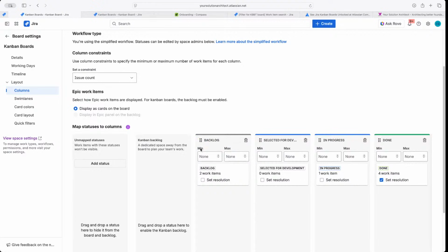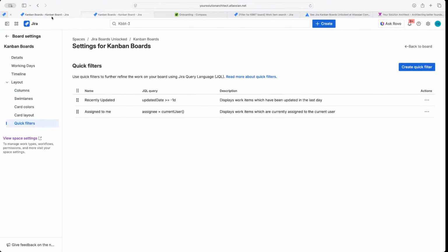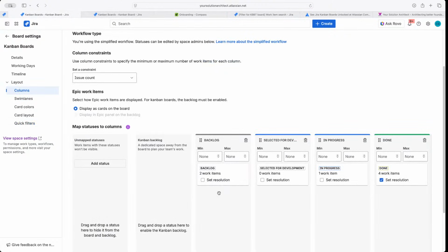This is where you can put your work in progress limits as well, those WIP limits. So we're solving the other card, I'll go back to it in a few minutes, of where do we put our WIP limits. We put them right here in our column itself, and we say you can have 1 ticket or 2 work items, whatever you prefer in your different columns.